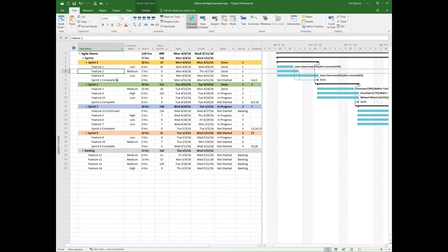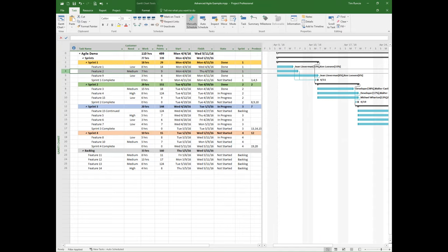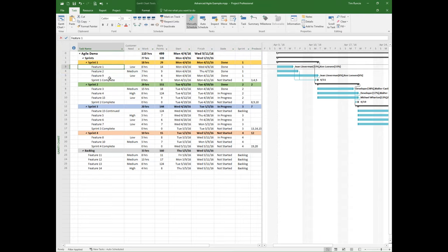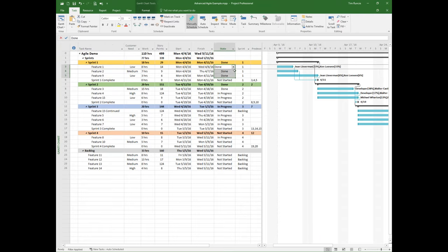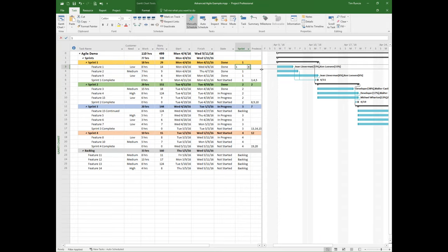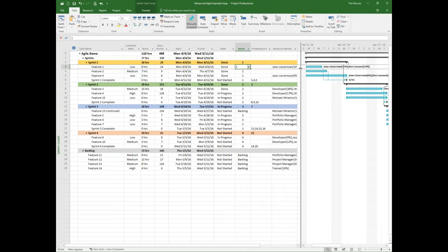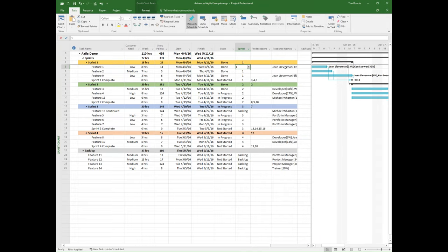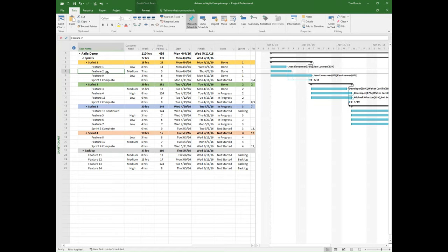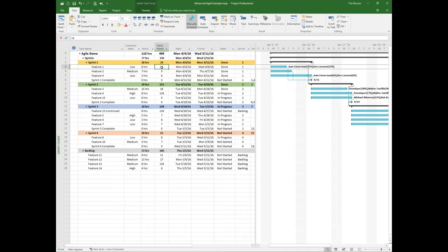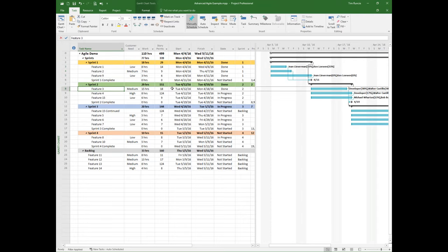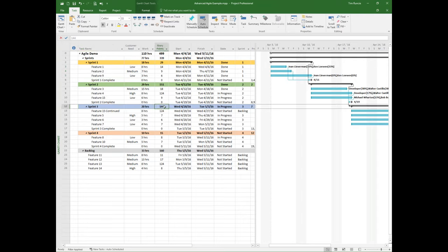Now, in other presentations, I've shown you how you can actually go and connect these activities directly out to Team Foundation Server. So that another tool is where the developers might be working can roll down and break out the details but have that pull back. But whether you're using a connection and you're pulling data in or out or this is the level of planning that you're working from, it's helpful to understand is it done, where's the state of this, having a lookup, and the ability to also plan what sprint it is. But let me show you a couple things that you can do. So by using just a few custom fields, I'm able to actually do some forecast planning to see, it looks like sprint one looking pretty good here. Oh, my, sprint two, 151 story points. That may not be quite accurate.